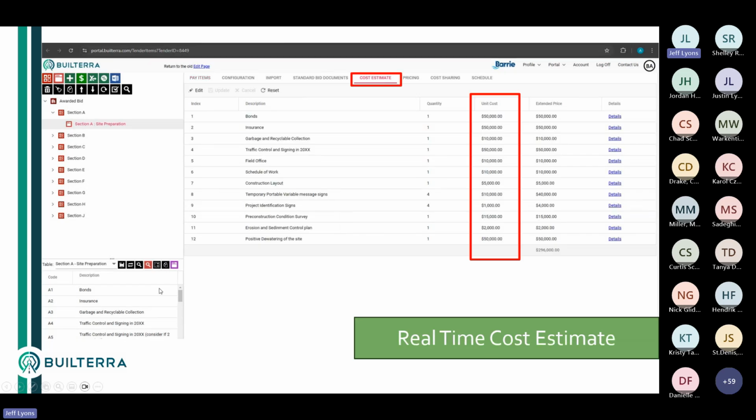One of them is, as you're dragging and dropping the item, the cost estimating is reviewing old data. Now, the thing about bids and tenders is they have a bid analysis export, which we'll see in a second, that feeds the system. So these prices are coming from the owner's database, essentially. And so you're not getting it from some national standard of pricing. This is coming from past historic data that you probably already have. And in most cases with bids and tenders, it's in that bid analysis spreadsheet that you might be downloading.